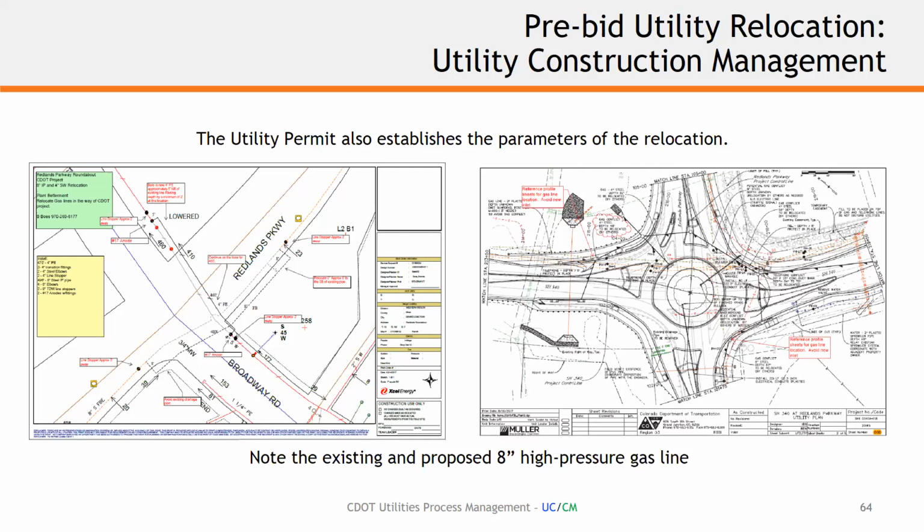If you can see on the right side of the screen, at the drawing there in the bottom right-hand corner, there's a box, and it talks about, please reference the plans, please avoid this inlet because your running line will essentially go right through it. And we communicated this with the office personnel, on a utility coordination meeting. We're able to speak to the office personnel of the gas company and say, be cognizant of this potential conflict. But where we missed the mark is not having eyes and ears in the field for construction management full time.